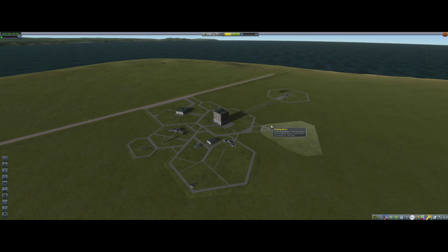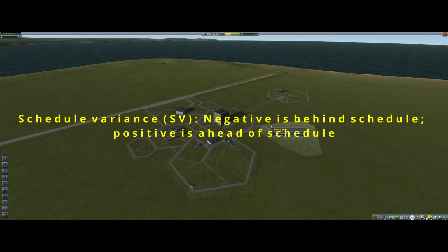For example, on the schedule variance, that it would be your EV minus your PV. So your EV, which was your percent complete and planned value, is going to be minus your planned value. So percent complete times the planned value equals EV, and then you would subtract your EV from your PV to get your schedule variance. And it allows you to see that delta in real numbers in order to make informed decisions.